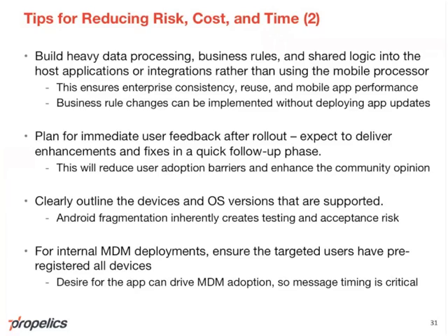For internal enterprise mobile device management deployments, so if we're not looking at the iTunes store, this is an internal deployment. It's critical that well before we deploy, the targeted users have already signed up and are on the MDM platform so we can push the app to them and not have that delay.